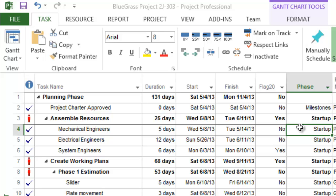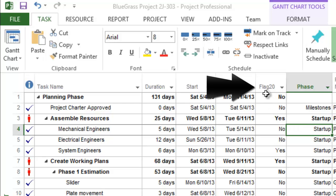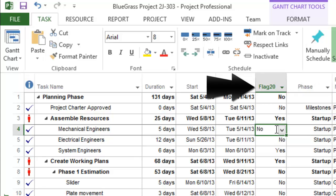To filter specific tasks or milestones, insert a flag column into your Microsoft Project Plan and place a Yes next to the tasks you want to present in PowerPoint.